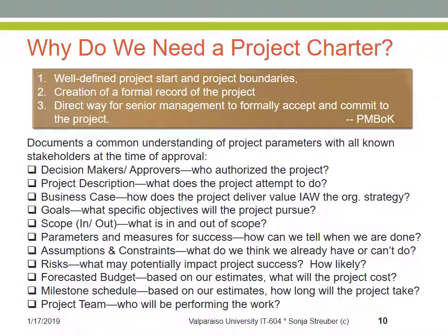A project charter addresses all of these points. It defines a project start, it defines project boundaries, it sets out project risks that need to be managed in order for the project to be more likely to succeed. Also, a project charter establishes a formal record of the project so that we have a baseline against which we can process changes with a well-defined change management process. And a project charter commits senior management to an interest in the successful execution of a project.